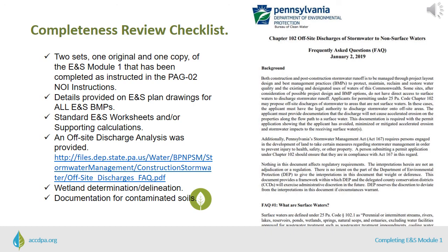Off-site discharge analyses are most likely required when runoff is discharged to a non-surface water. You may have several questions regarding off-site discharge analyses, including whether you require one and what information must be provided. Please read through DEP's FAQ sheet, found on their website, which should answer most if not all of your questions. This analysis is a completeness item during our review of ENS materials and is most beneficial when included in the original submission so we can avoid additional review time or even a denied or withdrawn submission.